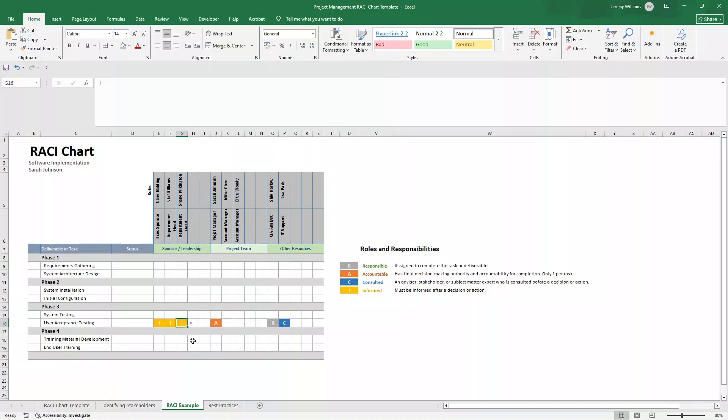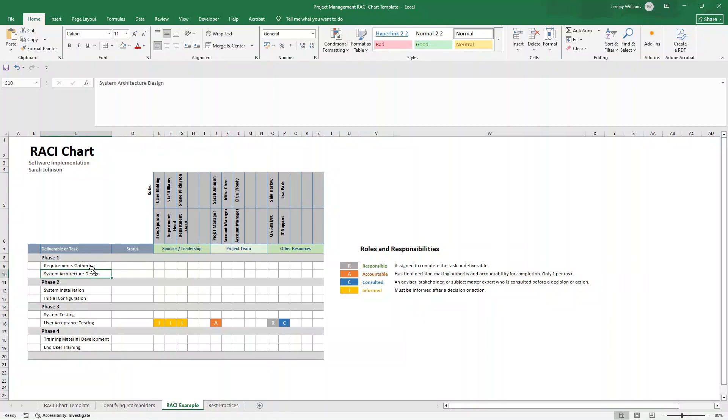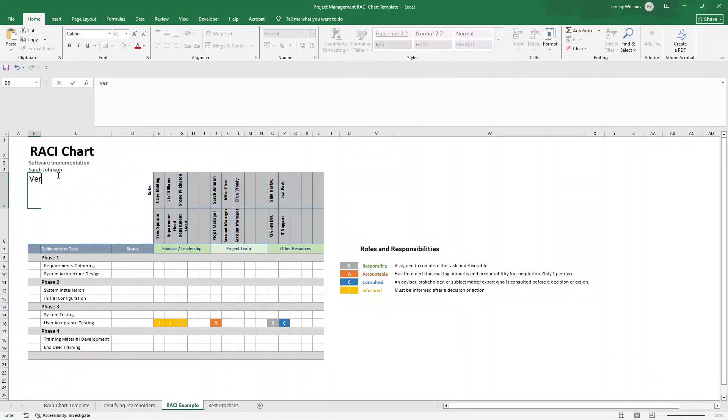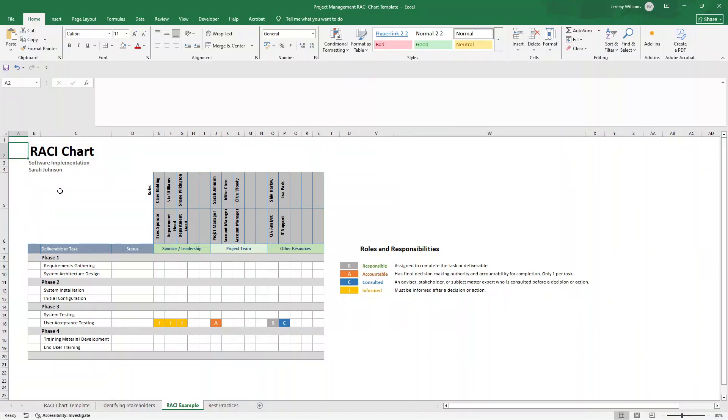So how would we manage changes, as an example, on this software implementation project? It will change during the project as new tasks take place, as phases develop. That's normal. That's to be expected. You just need to think about identifying the need for change, discussing with affected parties before making changes to the matrix, updating the chart and perhaps even changing the version number. So you could even put something like version number in here or somewhere at the top to indicate what version you're working on. Make sure you communicate changes to the entire team and be sure to archive old versions of this RACI chart for reference.